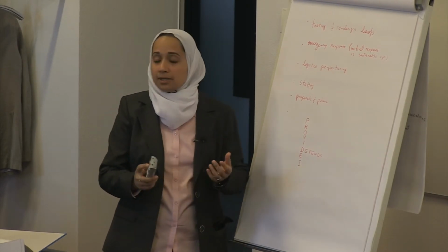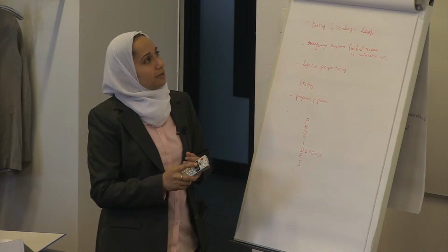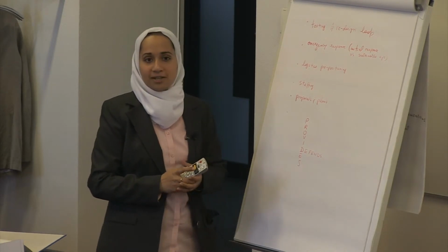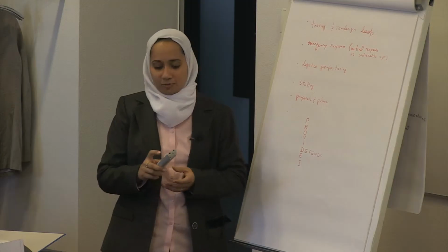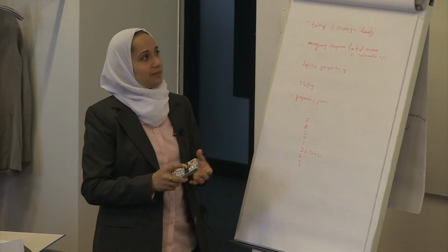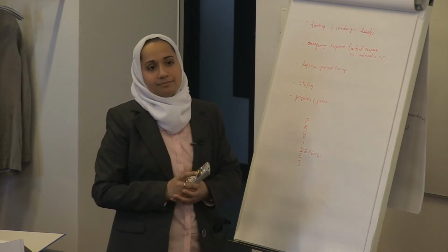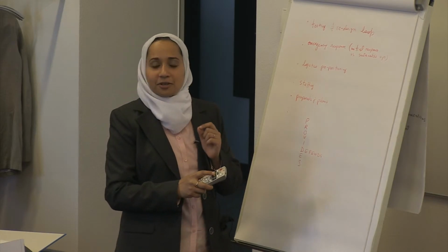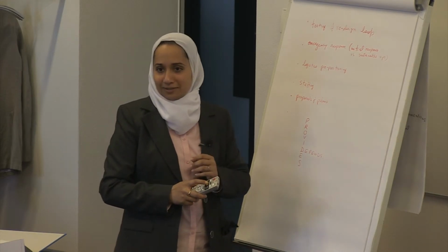Can anyone tell me what's interesting about this diagram after I introduce the X arrow? Is there any pattern that you can spot that's special? What's special about this red X here? Yep, you want to say something, Diana? It's right of the diagonal. Yes, exactly. That's the thing to note, that cycles occur on the right side of the diagonal.